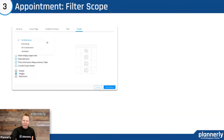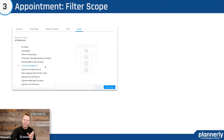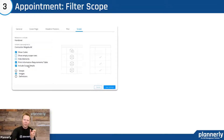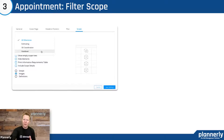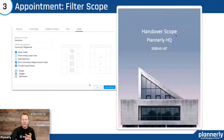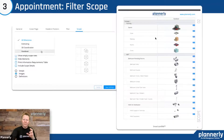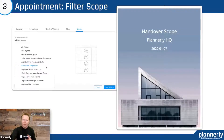Having all of this in one place is great, but when appointing somebody a key part of the workflow is not overloading people and being purposeful about what you ask for. A great way to do this is to filter specifically per appointment — choosing milestones, an information delivery milestone or purpose, and a team or task team that will deliver a specific output. These filtered PDFs form the contract and appointment documents, much more targeted for each appointment.